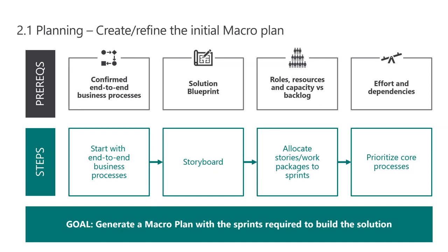And then towards the end, we're going to add on this process, which is infrequent but important to the business. We still need to deliver it, but it's not as frequent. It builds on top of the core process. So get the core process working before we add on the bells and whistles or the variants that are more complex than the core process. And that storyboard essentially defines a logical sequence of business process delivery.